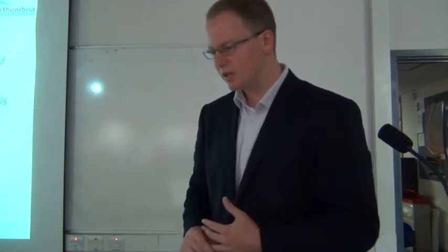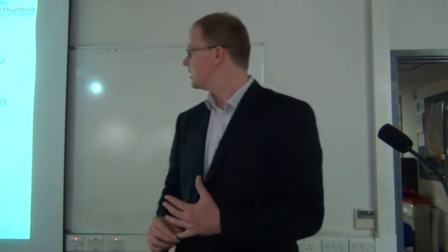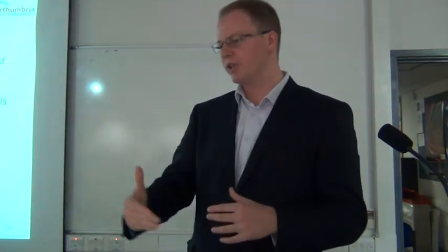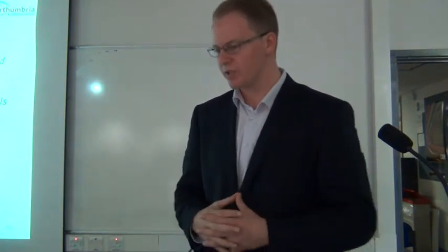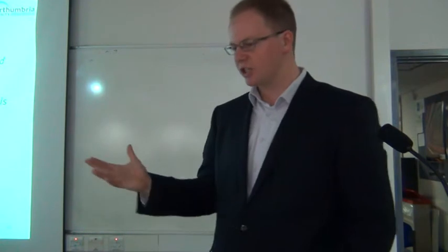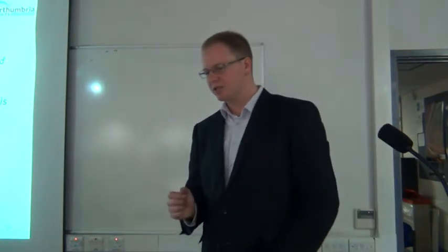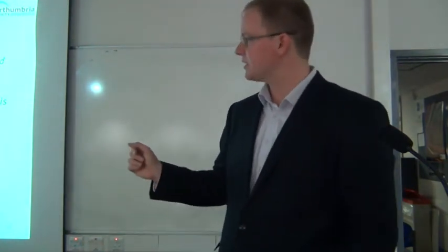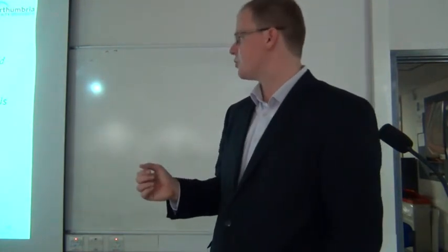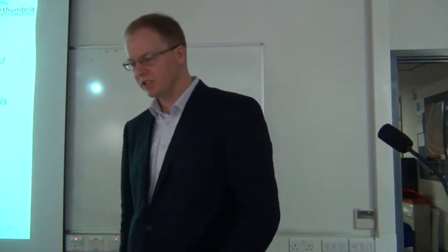That is the baseline, and it's often as well a gate approach, a gating stage for reviewing it in the wider setting of the business environment. The baseline is then used to measure change and ensure that scope creep does not occur if it's not wanted. In the Olympics or bigger projects, we have that actually quite a bit. Yeah? In the Olympics, we had enormous scope creep, and it's anticipated.